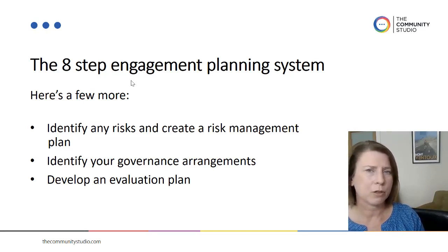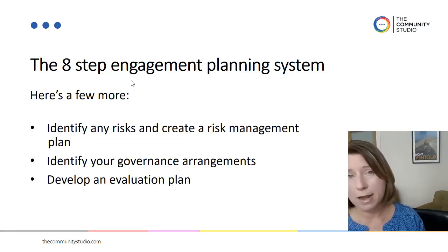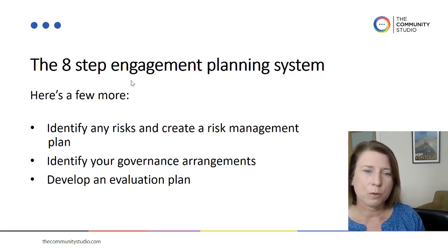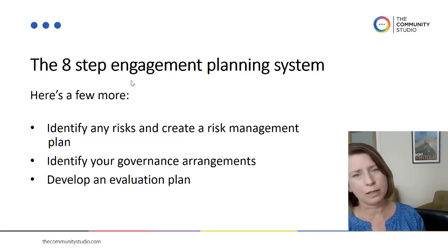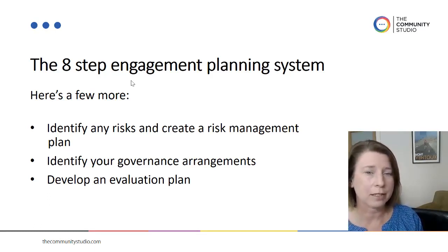And developing an evaluation plan. This should really be a monitoring and evaluation plan, but this is knowing what you're looking for, what the signs of success are, and what the successes are, so you can make any changes along the way if things aren't quite panning out as you expected. And also so you'll be able to write up around, well, this was really successful and this doesn't work quite as well, and next time we'll do it differently. And so you can do that continuous learning around your engagement processes in your projects.